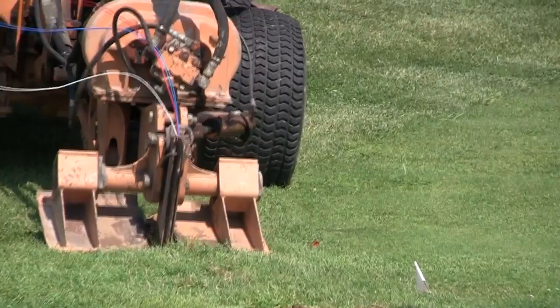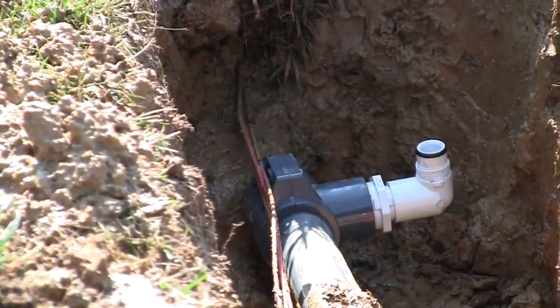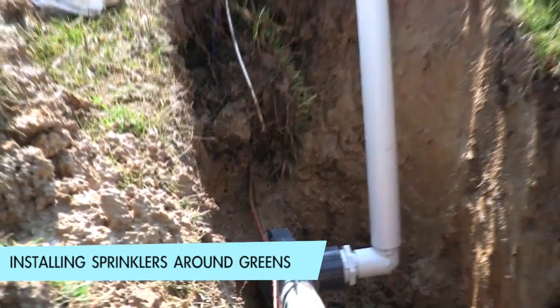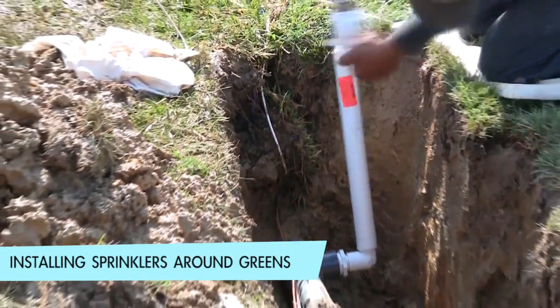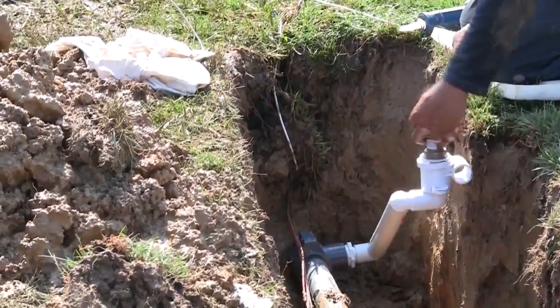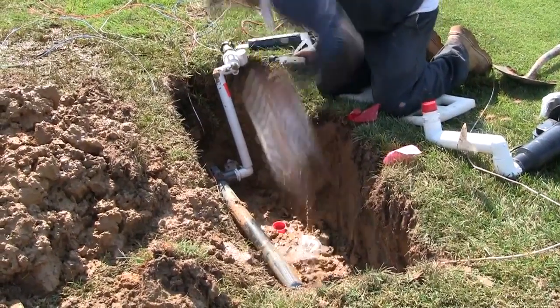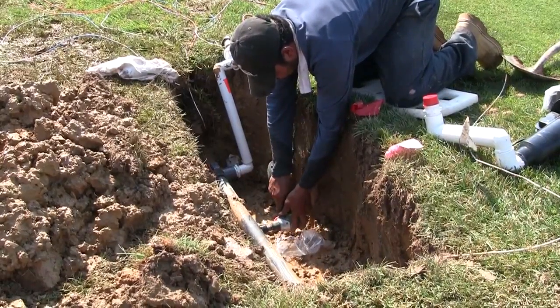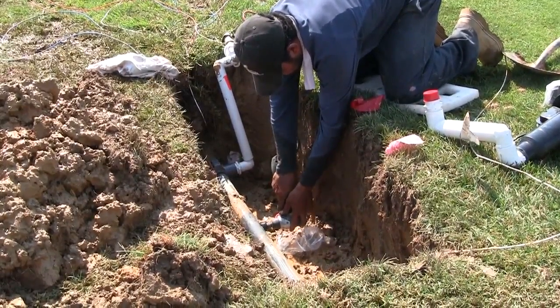This new Toro link system is going to more efficiently use water. It's a double row, some places a triple row system. We're going from 248 sprinkler heads to 829 sprinkler heads. We're increasing our water capacity from 700 gallons a minute to 1,400 gallons a minute.